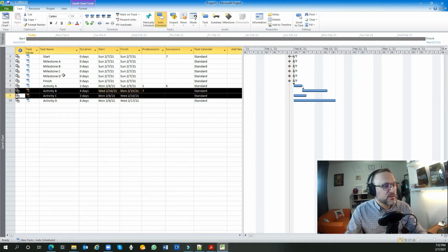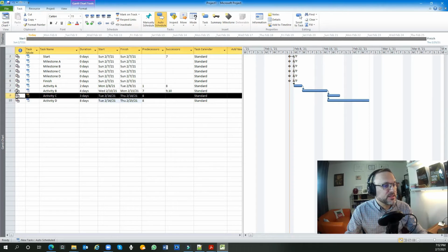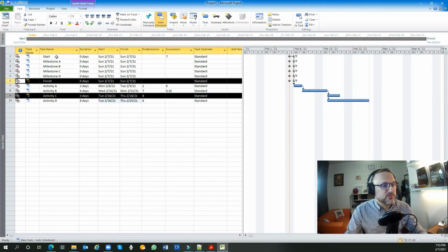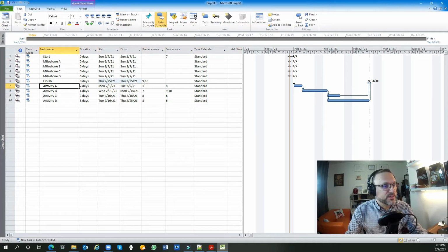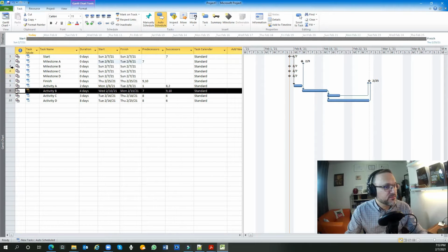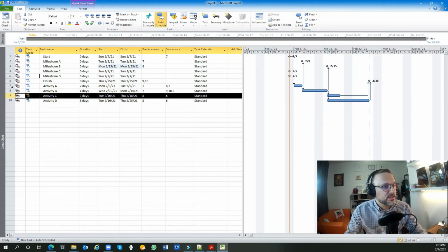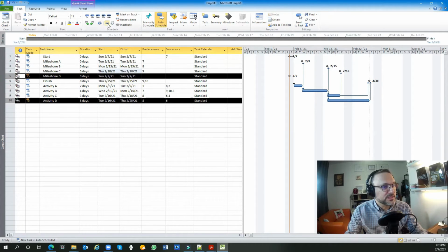Once B is starting, C can start. Then I will say once B is started, D can start. And once activity C is finished, the project is finished. And once activity D is finished, the project is finished. Now, let's connect the other milestones. So once activity A is finished, I have milestone A, B is finished, milestone B, C is finished, milestone C, D is finished, milestone D.